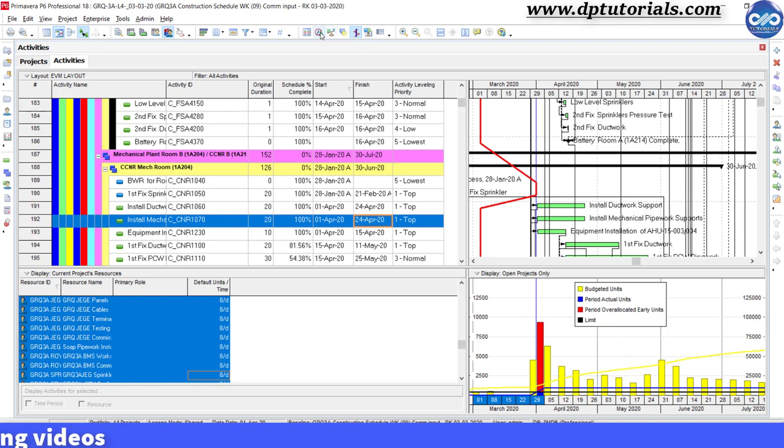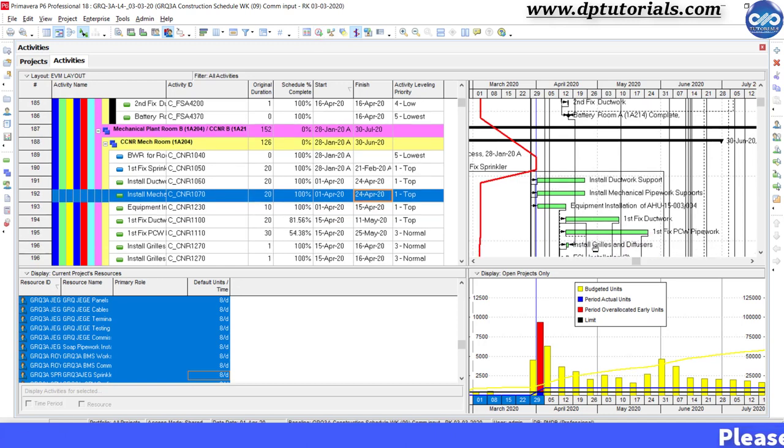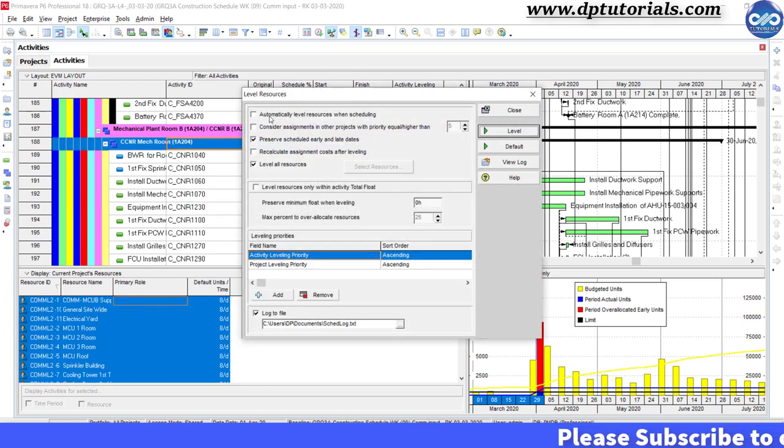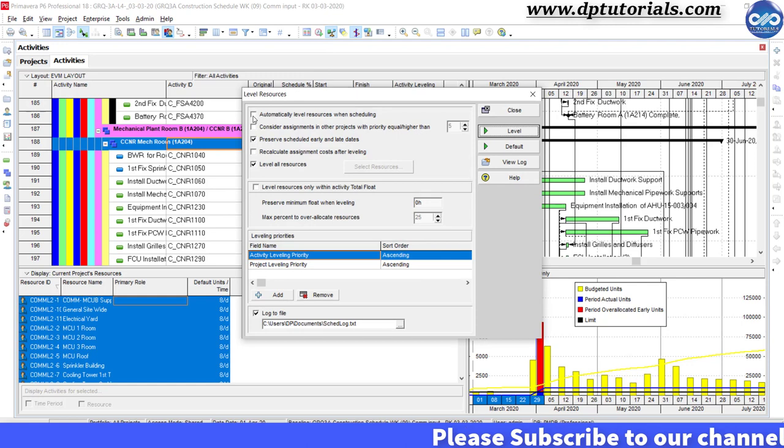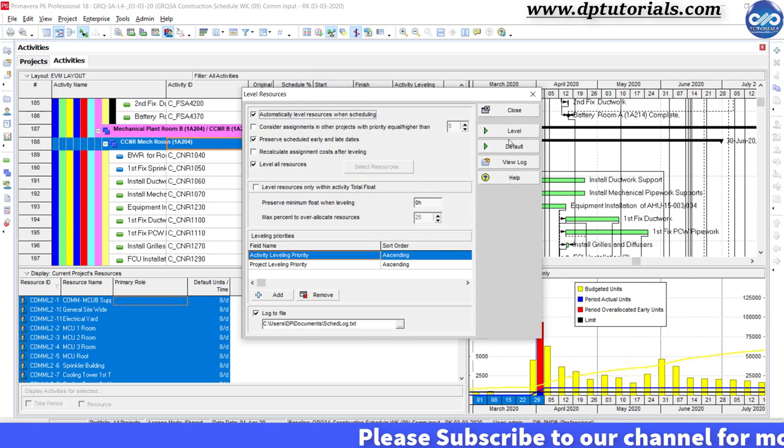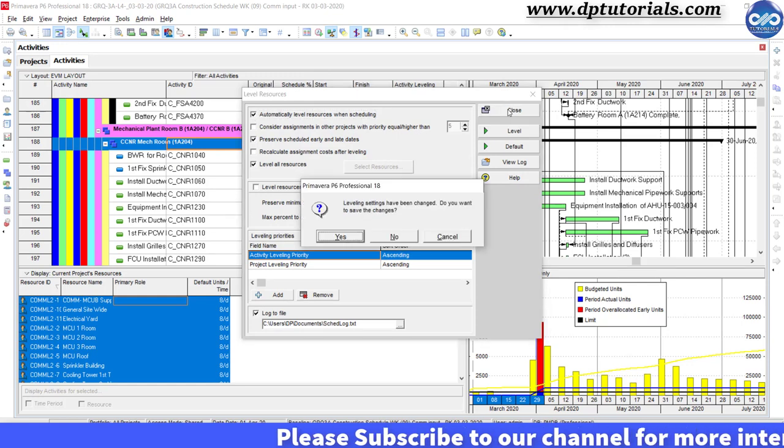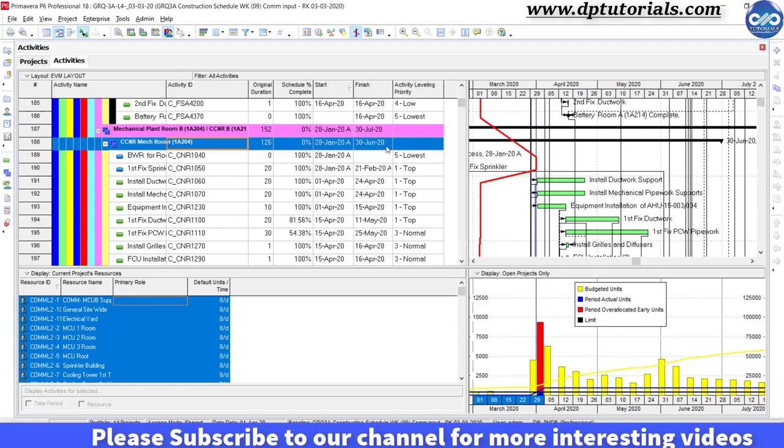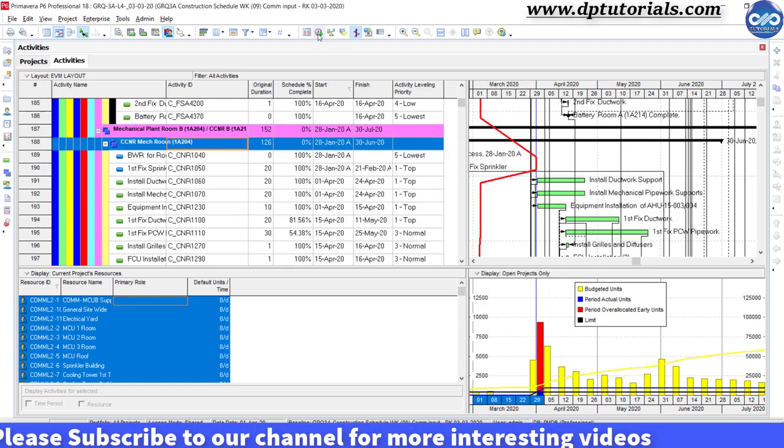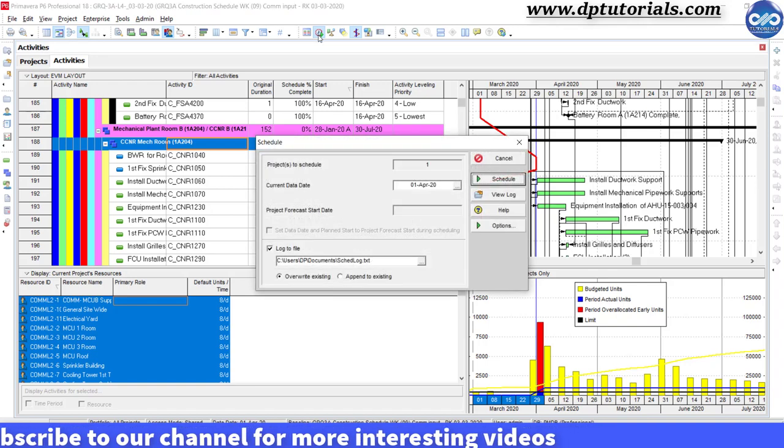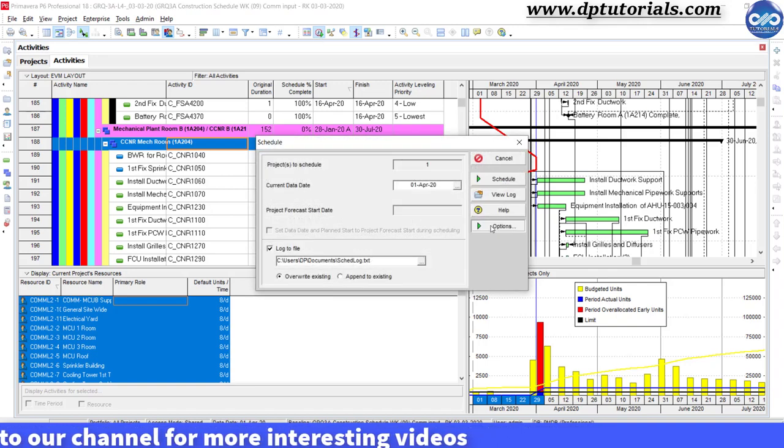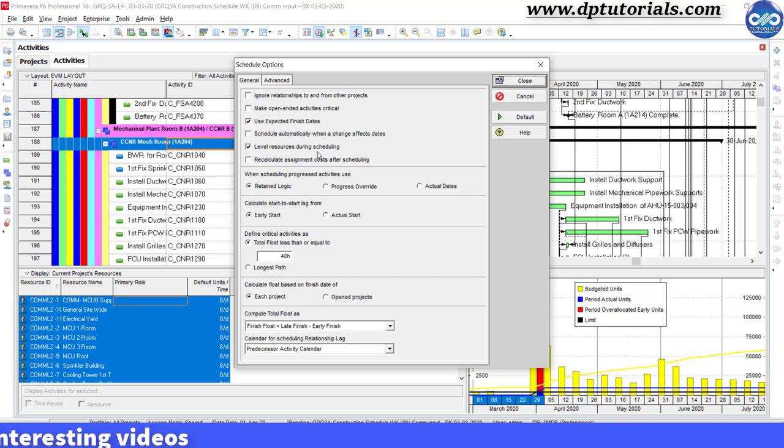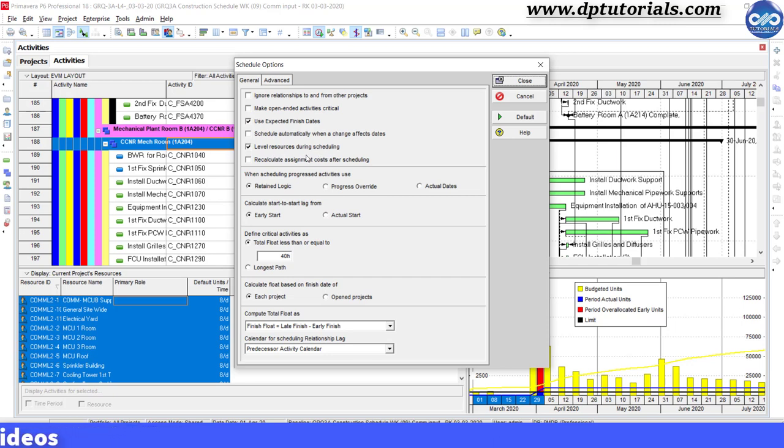In order to maintain the new dates for the schedule going forward, you have to make some more changes. Go to resource leveler and select the option to automatically level resources when scheduling. Close this window. Go to schedule options and tick the checkbox for level resources during scheduling. This will help you in maintaining the actual dates and leveling the resources by changing the dates.